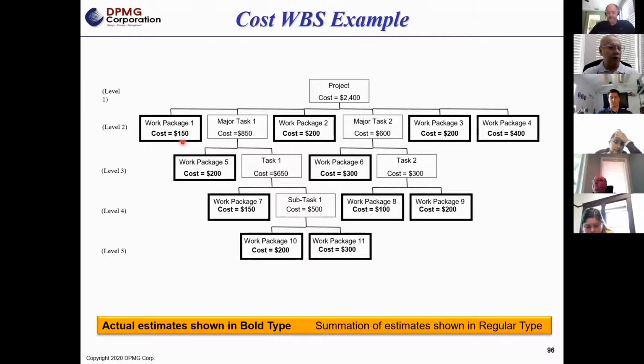Let's not worry about your material costs at this point. I just want you to run through the exercise that we're going to do very shortly with whatever effort hours you've identified, and multiply it. Then create a new tag, use a blue tag, and enter the dollar amount on that tag for each of the individual activities.